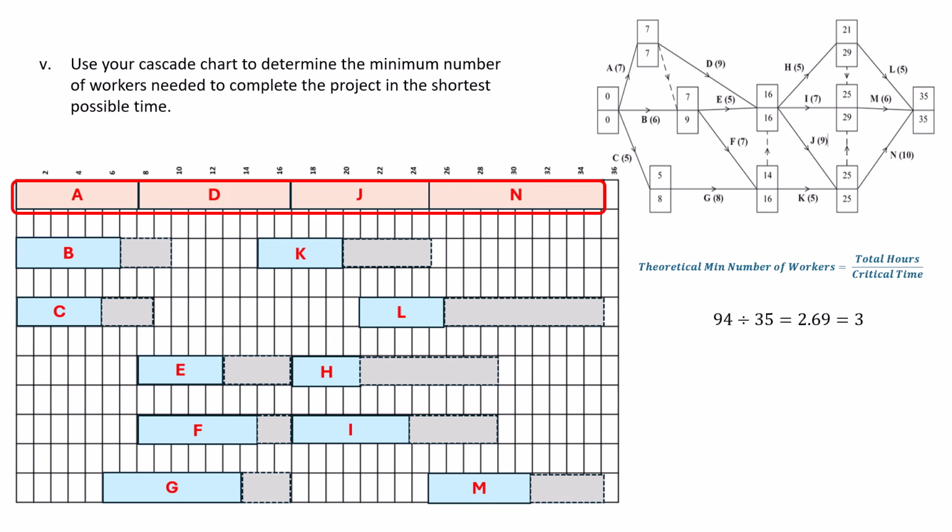Just some things to remember when we're doing this. We're going to assume that each of our activities starts and ends on time. So we're not going to worry about that grey part, we're not going to worry about our float piece. We're just going to work with the early and late. We're only going to work with the actual duration piece.